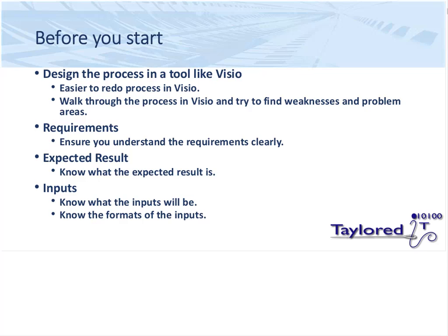Doing that in Visio can take 2 to 4 weeks. But if I went through as many iterations and changes in PAM itself, you're looking at 2 to 4 months potentially. So you could seriously compromise your project timelines if you don't do something like this.